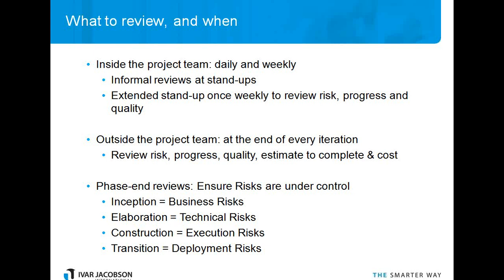Then once a week, an extended stand-up to review risk, progress, and quality. So taking a look at what was accomplished over a bit longer time span, is it tracking on what the team's expecting? To revisit the risks to see during the last week, were we able to reduce any risks, mainly by reducing the probability through executing and testing some scenarios of code that we built.